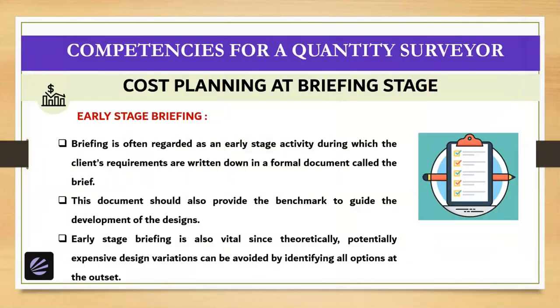Early stage briefing. Briefing is often regarded as an early stage activity during which the client's requirements are written down in a formal document called the brief. This document should always provide the benchmark to guide the development of the designs.